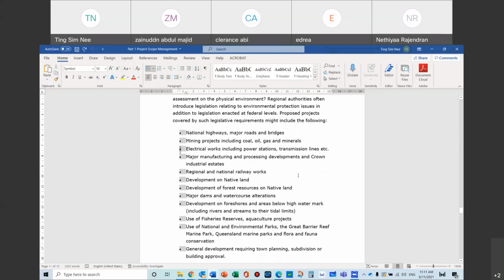You need to put this project in the center, and then you draw the circle. The technique is you draw the circle, first layer. This first layer, whether it's a private project or a government project, would be inclusive of private factories and all that, not nationally owned factories, but factories which are all private companies. So you think about the company itself. What are your policies? What are your rules? What is your management like? Internal things, and the money, the financial, the economics, the resources that you have in the company. Okay, so these are the first layer.